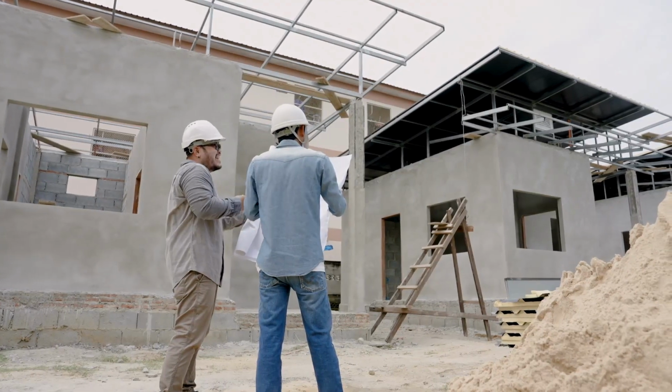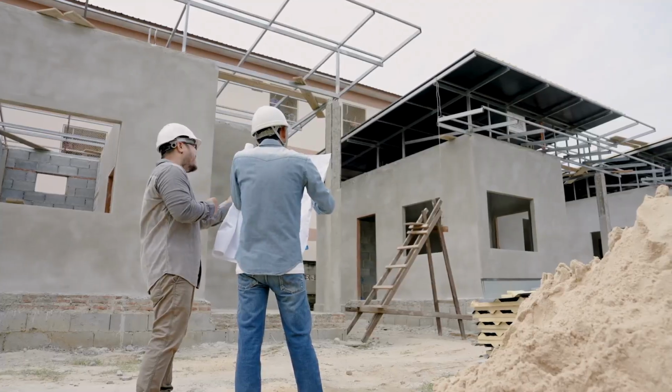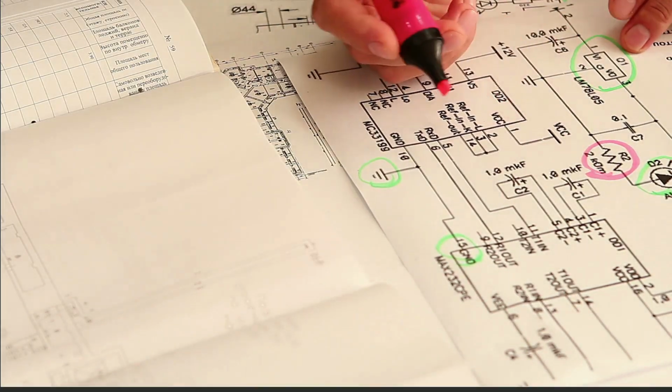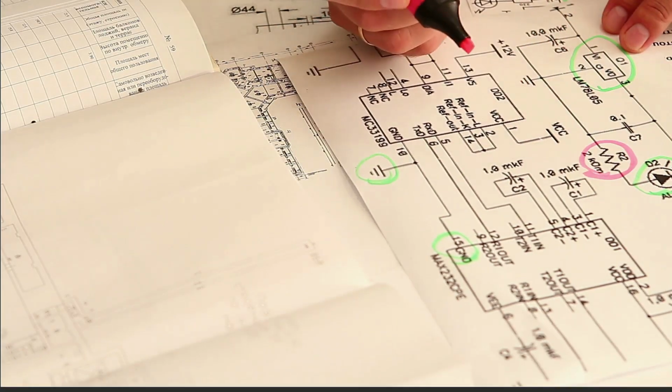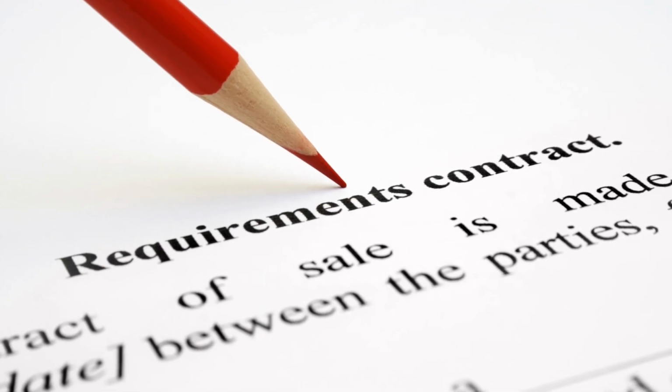Provide the site. Secure permits and easements. Make timely payments for work properly performed. Give the final yes or no on major decisions, and provide essential information and approvals promptly. Delays on their part can cascade through schedule and budget.